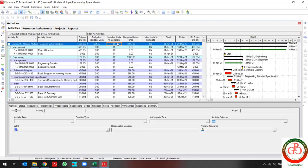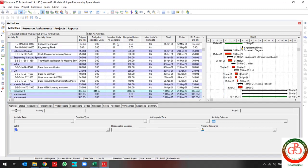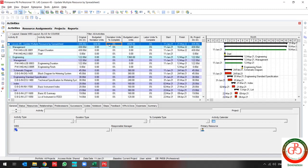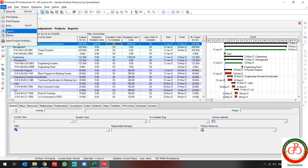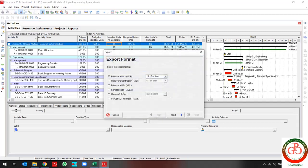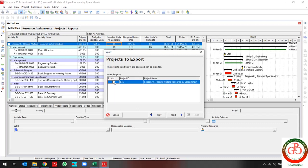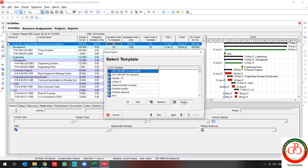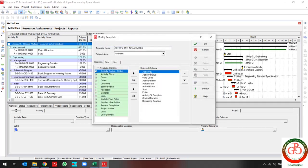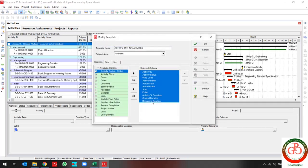As you see, this is my project without any progress. For this kind of update, first you need to export by a spreadsheet only for the activity section and do the export and find these fields.